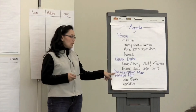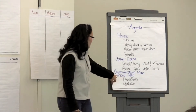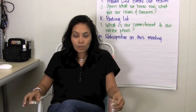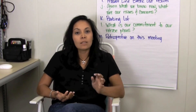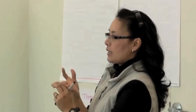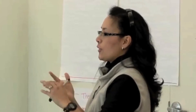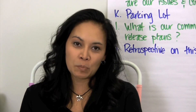The key to having a successful release is to follow up on what you agreed upon in the release planning meeting. As a Scrum Master, I make sure I've documented the decisions the team has made, schedule all the meetings they've agreed upon, facilitate those meetings, follow up on action items, and track decisions and dependencies. This is how we do release planning at Rally. It has taken us many years to get to this point. Be patient, have fun, and good luck with your next release planning meeting.